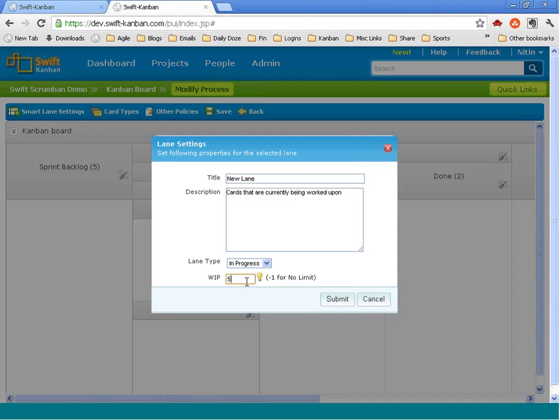But the whole purpose of limiting WIP is that bottlenecks arise in the system, and therefore you know exactly where the bottlenecks are, and then you can reset your WIP limit to take care of that bottleneck, or take some other measures, so that overall you come to an optimum level where everyone is working to their capacity. So the answer is yes. Kanban allows you to set custom WIP limits.